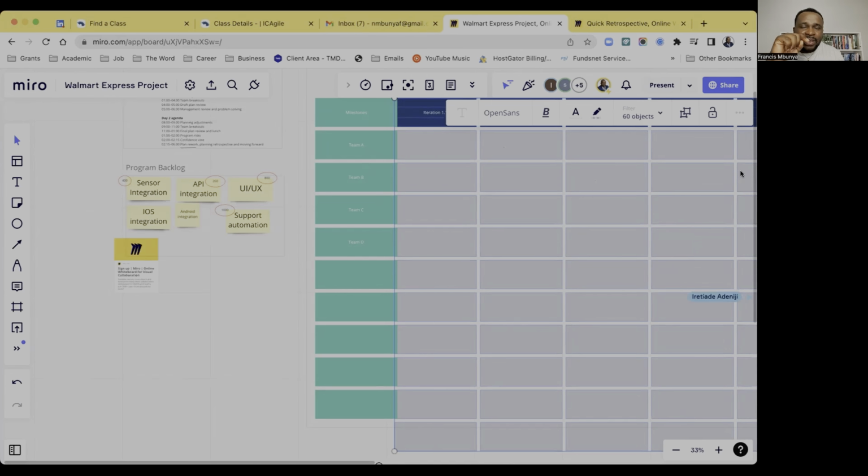And then we're estimating that if they can complete about 260, or let's say 200 for every quarter, then we expect that 800 story points should be done in how many quarters? 4 quarters. So now we can design a term of contract for the UI UX for 1 year. Now, just imagine if within that 1 year, you are not able to support your team to deliver this result, and there's still a lot of carryover, right? So that we have performance issue. Now, when it comes to year, this need to be broken down, right?